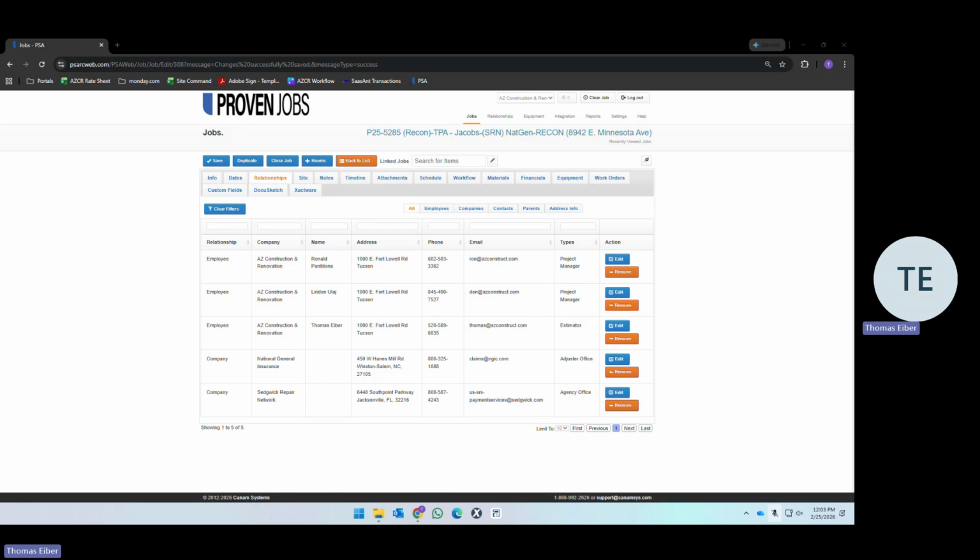You protect the margins via change order control and different changes that happen. If you can get them to select materials that are under their budget, if you can provide good distribution of labor based on skill sets so that we can use less labor than is estimated, you have the ability to protect the margins with that. Any time that you have to diverge from the budget that you're given, exceeding that amount that you spend needs to be discussed with management and your operations manager.